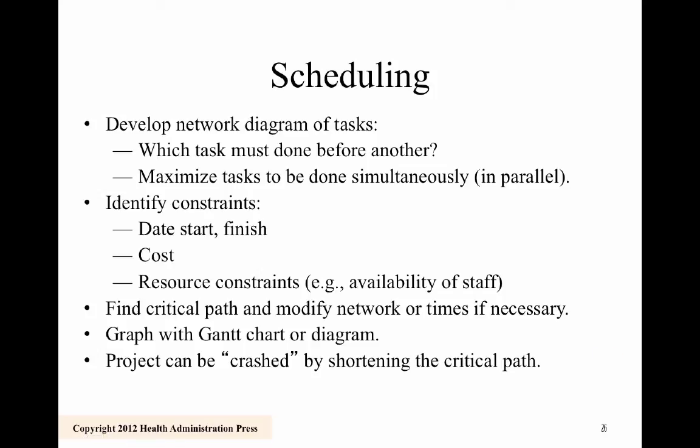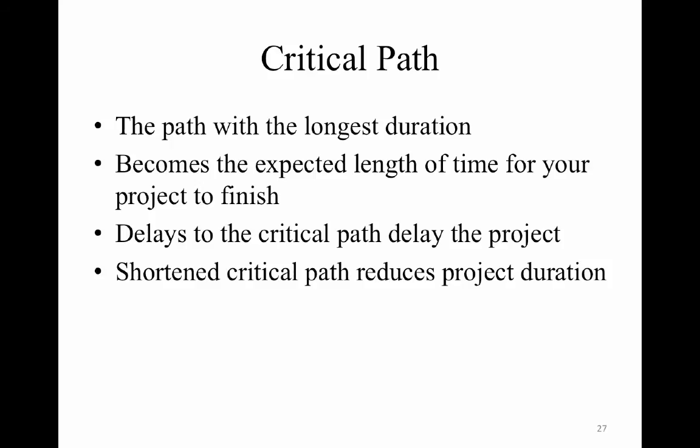Now when I schedule, how do I schedule? Well, I develop the task order. I need to know what must be done before another step can be done. If I can work on multiple steps simultaneously, that's even better. Okay, so this allows you to find that critical path. And it also allows you to graph it out with a Gantt chart so you can monitor the project.